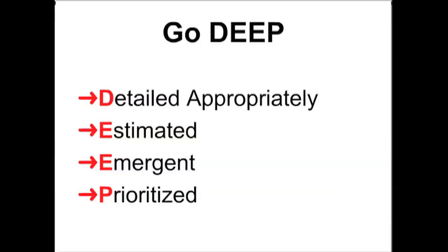Yeah, absolutely. And we talked about how we have several fixed kinds of meetings: our daily stand-up, our sprint planning, our retrospectives, our demos, within a traditional Scrum or Agile process. But backlog grooming is one that each team has to tune for themselves, and do as much as necessary and as little as possible in order to have vision and enough detail, maybe 2 or 3 sprints ahead in their backlog, is the rule of thumb that I usually use in terms of prioritization. And, of course, that can change sprint to sprint.